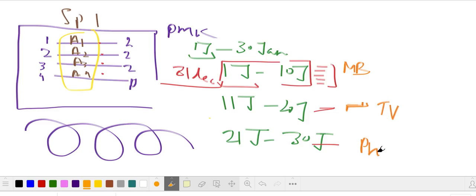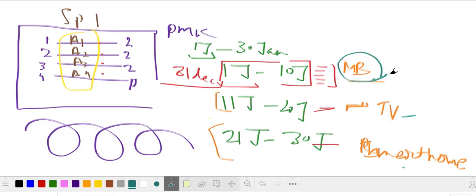Suppose I said, here I will make mobile pages, here I will make TV pages, and here I will make smart home pages. That's just an example. So I know in this sprint I'm talking about smart home pages, in this one TV pages, and then mobile pages. Suppose Apple is releasing Apple TV, Apple Smart Home, and the mobile. We're going to talk about the mobile in detail because we are in this sprint. We already know we're going to talk about Apple TV here, and smart home here, but we haven't planned these in detail yet.